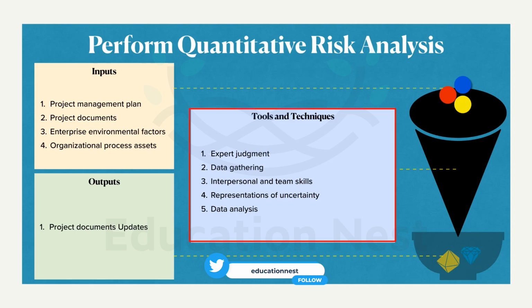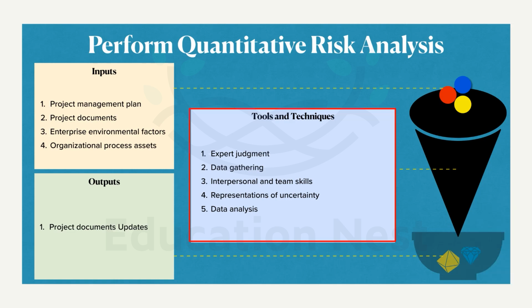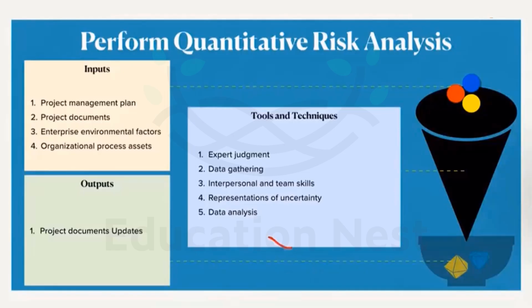What happens here is you have to populate the inputs into this software: the probability, the detectability, the type of risk that we are dealing with, and the quantity, based on the experience from previous projects or from other industry-wide risks. They are given as inputs, and then we get an output curve, kind of an S curve. We get something like this, and we have to interpret the values based on these outputs from the simulation software.